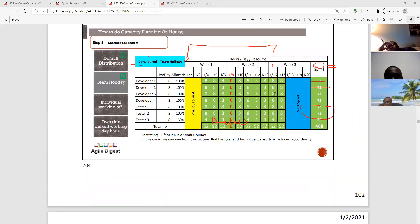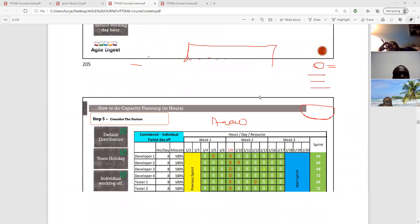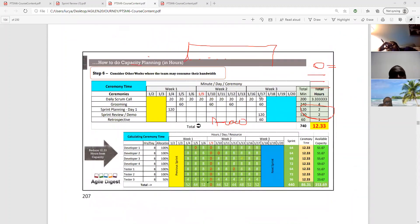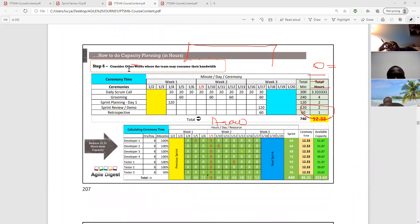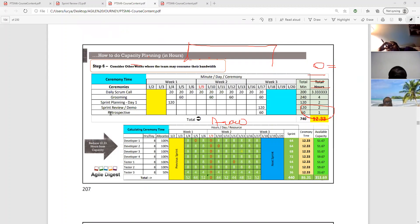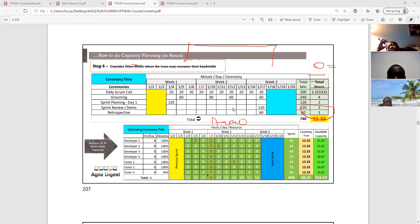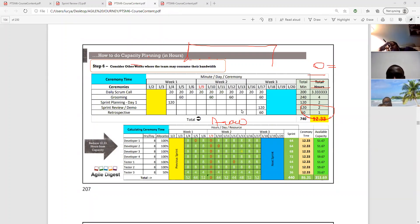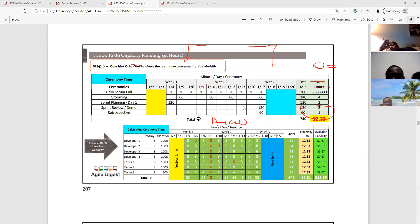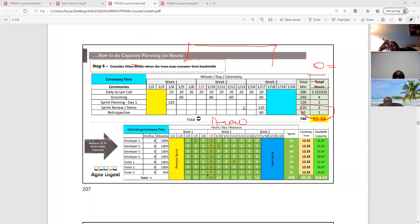Now, we are going to look at another scenario. You have eight hours a day, but you don't work all the eight hours. As a regular Scrum Master, you're going to have your daily Scrum. You're going to have a grooming meeting. You have sprint planning meeting. You have sprint review. You have sprint demo. All these are things happening at some point in time within a two-week time frame. So we are not going to be allocating 80 hours dedicated to building products. I want everyone to be very clear about that before we move on. Do each and everyone understand your available hours and the difference I'm trying to make about hours that you are going to consecrate for building the product? Is that clear? Yes. Yes.